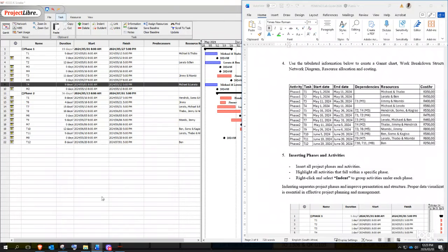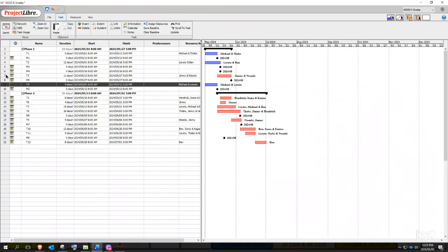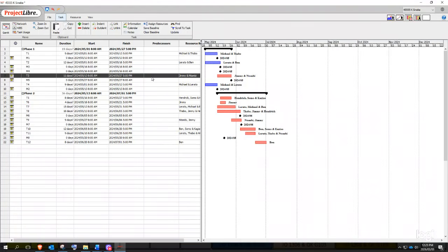Right? So we are assigning T1 to T3. So we go to T3, under predecessors. We then going to put our T1 using the task ID. So we observe, what is the task ID of T1? It is 2. So we put 2.